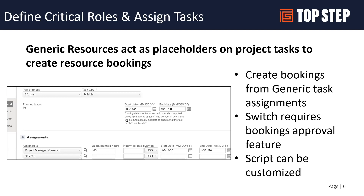One thing to note: this only works for generics. So if you were to swap out your project manager for a named resource on your proposed project plan because you know who your PM is going to be, and you use that create option, it will ignore the named resource and only create bookings for the generics. The idea from OpenAir is that you have your project plan with the resource types, amount of effort, and dates, and now you can go ahead and create requests to your resource team in an automated fashion.